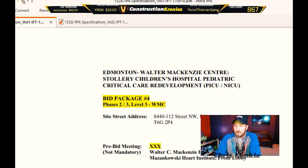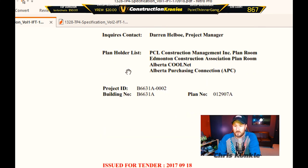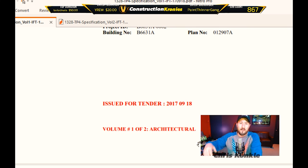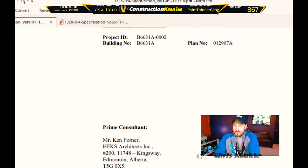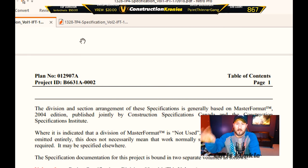The front cover will have job information, job number, site address, and all those things. Issued for tender 2017-09-18, so there will be a closing date there. This is volume one of two of the architectural specifications — you'll have electrical, mechanical, and so on as well. It tells you the consultants' information; anybody you need to contact for information will be on the front few pages of the book.